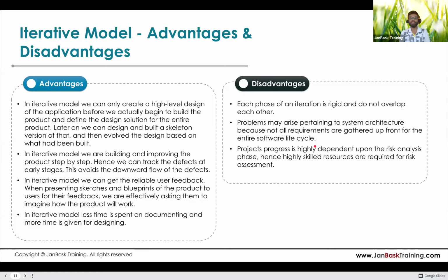What is affected here is the system architecture, because the design and architecture are also not fixed. So if we come up with some requirement which can affect the architecture as a whole, it becomes difficult to implement. Did you get this point? At a later stage, if a requirement requires the whole architecture to change, that might cause problems.